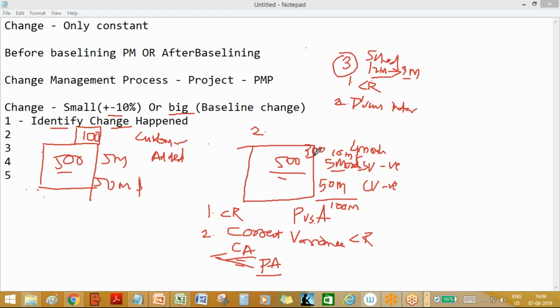Some customer calls you and says, okay, Mr. Sivan, just take this request, I will put a change request afterwards, please start the process. So either you have to do it on his behalf, but the protocol has to be followed. If he doesn't have the time or the access to the tool, you have to write the document on his behalf: this is a change request, the original was this, the new is this, and that's the change request. Correct? Are all clear on the first step?